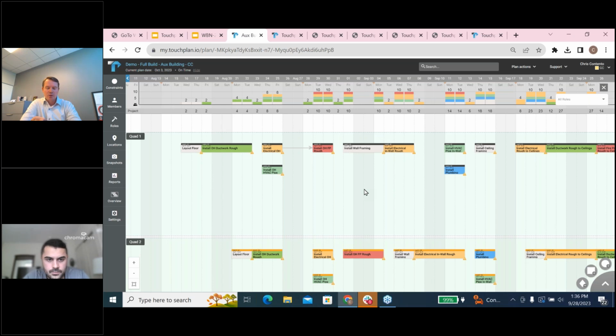Yeah, again, going back, the last planner system and the tools and strategies that whole deal encompasses is something that we do on every project, and it's just part of how we approach our work. From the beginning, we've got a master schedule, but we look at how we are going to break that master schedule up into chunks of pull planning efforts.